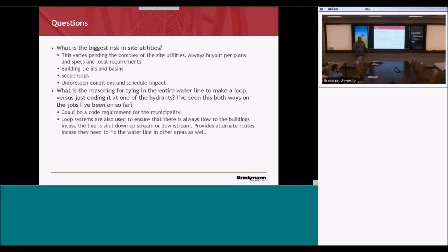If we were responsible for the utility locates and somebody destroyed all the locates and they come to work the next day, they're going to throw their hands up and say, I can't go, I'm done, no locates are there. And we'd have to eat the cost of that delay. Whereas if it's in their name and they're responsible for it, that's how we bought it out, it's completely up to them. And they have to protect their own utility locates as well.